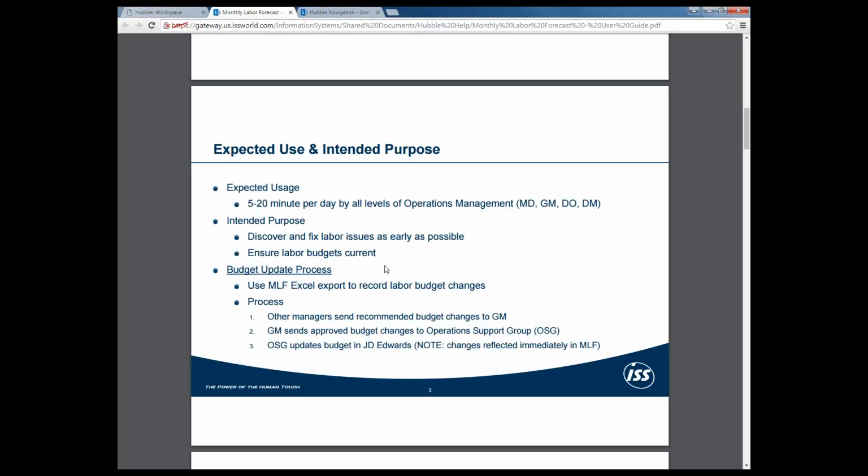One example that happened this morning on a previous call was that we saw one of the jobs was approximately $700 over budget. At this point we're only a third of the way through the month. Drilling down into that job, we found the timesheet showed 3 employees working every day.